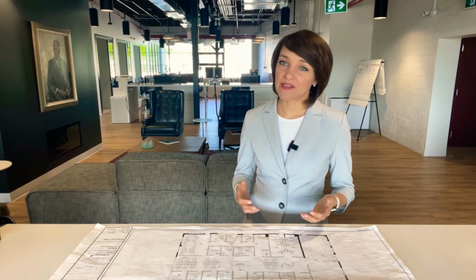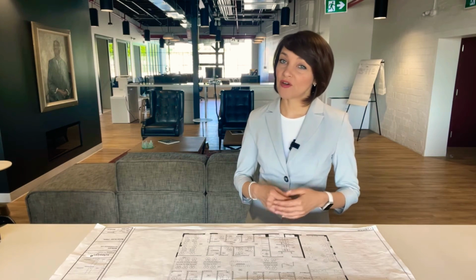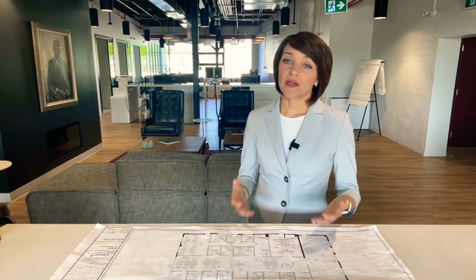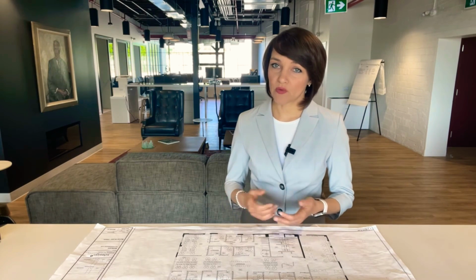Now I will give you a short overview about the building process from the beginning to the end. When buying a buildable lot, I consult my clients on different aspects that might affect the building plans. Each building site will represent its own set of opportunities and restrictions. Restrictions often are connected to historically designated areas, environmental regulations, and so on. To obtain all necessary permits, owners must comply with those regulations and usually submit the application to the Committee of Adjustments. The process of obtaining permits can be easy, but it also can be very complicated. I recommend hiring an architect and a builder. Those professionals will walk you through all the stages of the construction process.